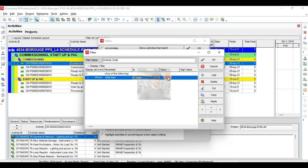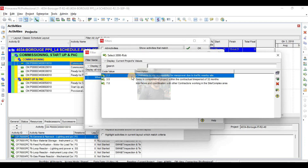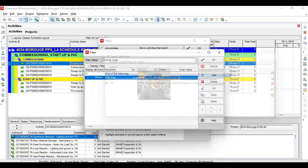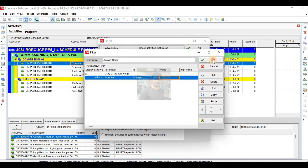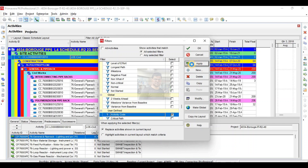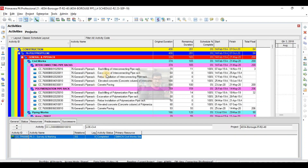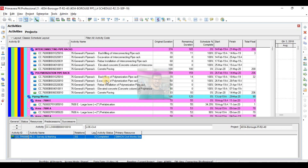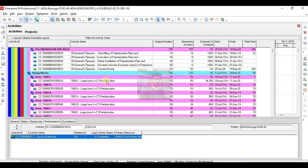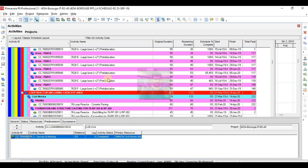Let's see what is in risk. In risk I have defined three kinds of risk: constraints to site accessibility for manpower due to traffic nearby the site — this will include those activities which are away from site or where accessibility is difficult. So here we can see backfilling, excavation, elevated concrete, prefabrication. In my project, the prefabrication workshop was almost 10 to 15 kilometers away from the site location, so these are activities where accessibility is difficult.